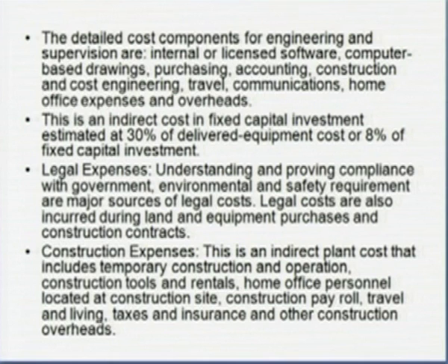The contingency factor here varies in the range of 5 to 15% of fixed capital investment, with 8% being a reasonable average value. So, this was the detailed discussion on components of the fixed capital investment.